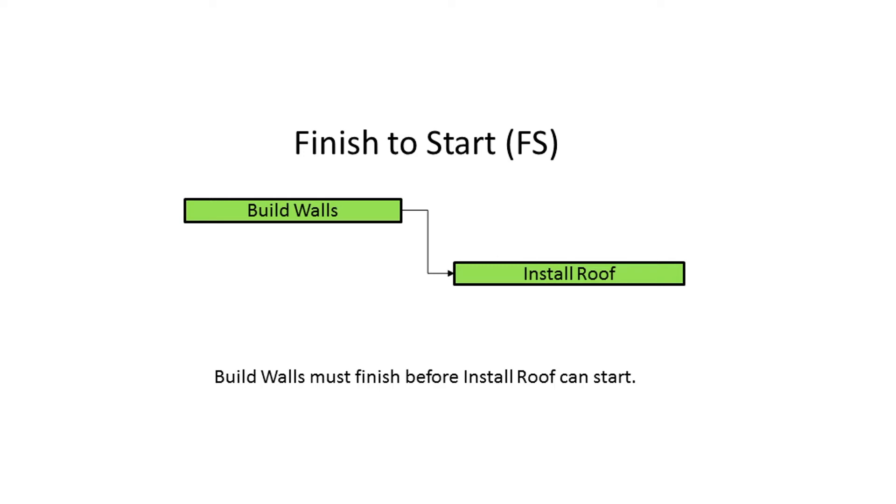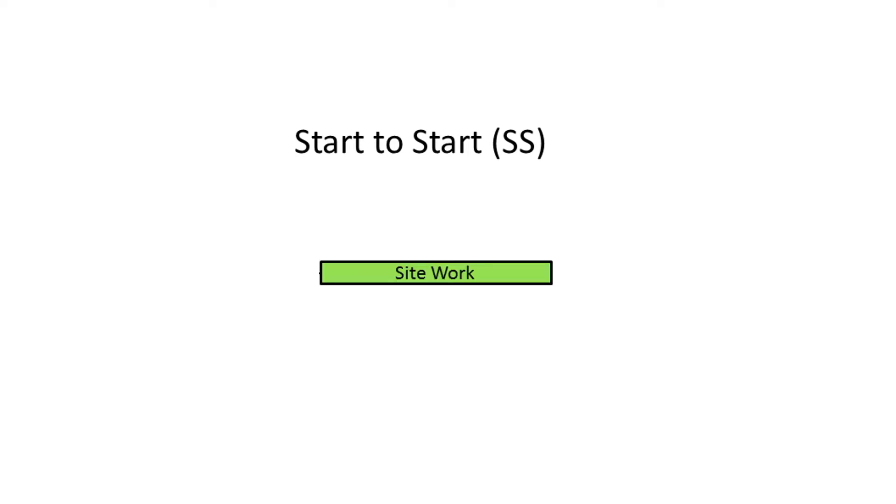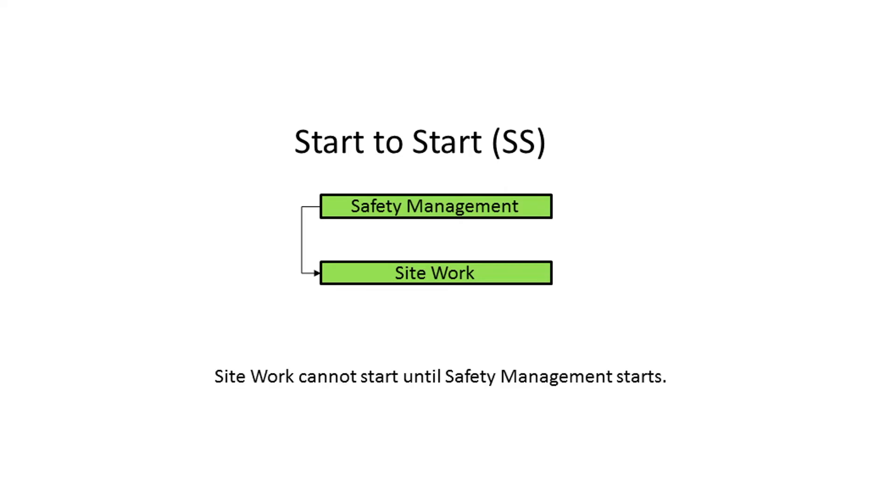The next two relationship types are also in common use. The first is start-to-start. This relationship type states that the succeeding activity cannot start until the preceding activity starts. In this example, site work cannot start until safety management starts.